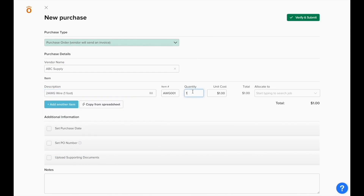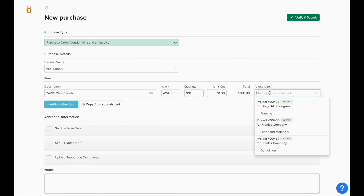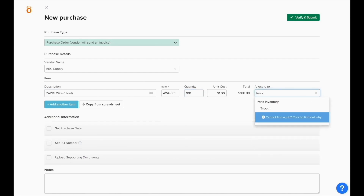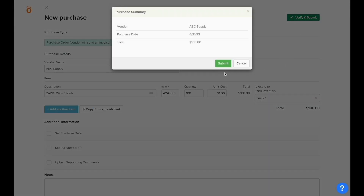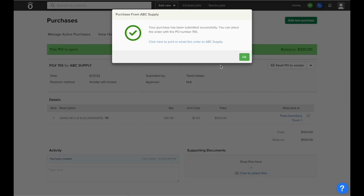But when we go to allocate these materials, instead of allocating them directly to a job, we can type in the name of our inventory location. When we submit this, NOFI will create a purchase order that's pointing at the inventory location instead of a project. It'll generate a PDF which can be emailed to the vendor as necessary.